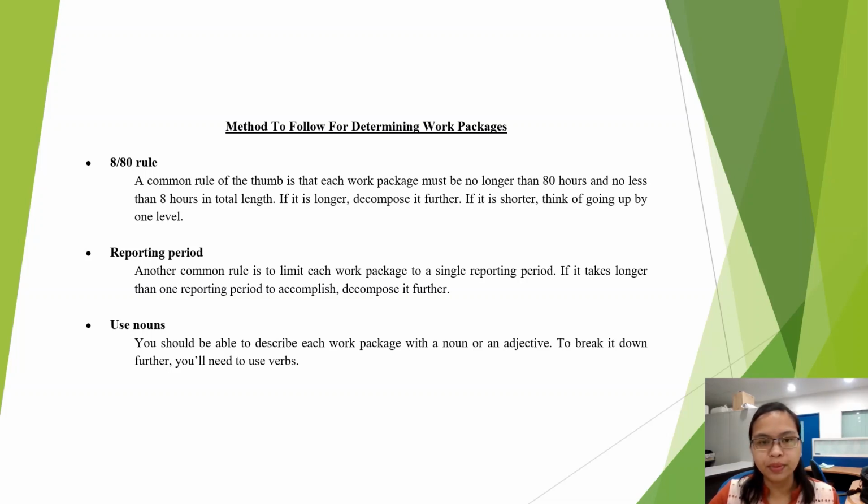The reporting period: it must be in a single reporting period. And the last one, use nouns. Use nouns means we must be able to describe each work package with a noun or an adjective. To break it down further, we need to use verbs.